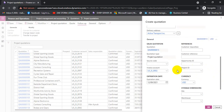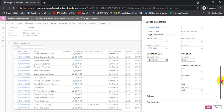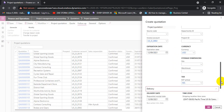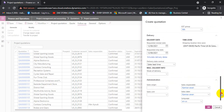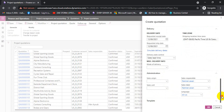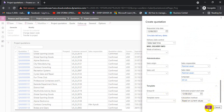As we don't already have a project, we will not select a project here. Sometimes there is a case where we already have a project from a customer and we give them a new quotation — then we can attach that quotation to a previously built contract. Delivery and other dates we can check here. Under the Administration tab, we can check who is responsible and what language will be used. If any template for the quotation is being used, we can select a header group template. Right now we are not using any template, so we just click OK.